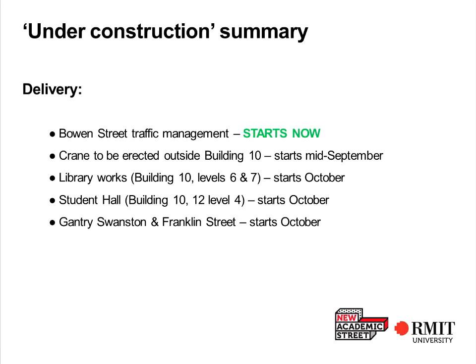We're working really closely with facility services around risk mitigation of cutting fibre, loss of service, all those types of things. So we do have a robust set of principles around how we do the work. If and when we do cut services, the idea is that we get them back online as soon as possible, and then the communications follow about how things run from there.